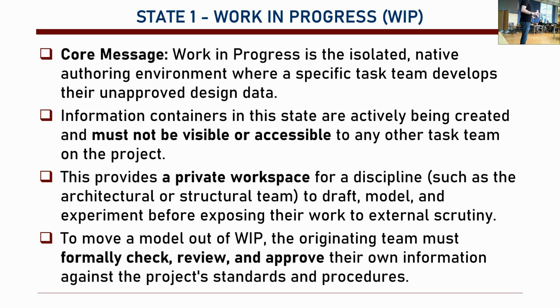Because we can break down the structure into different spaces, we can make sure that one team works on one space and the other one works on another space, and they don't basically see each other. We can do that. Okay? So work in progress in that regard is not only related to one discipline. It can be within different teams in that same discipline too. Okay? So they should not be visible or accessible to any other task team. You see task team. The task team for studio design, the task team for canteen design, for instance. You can do that. Okay?